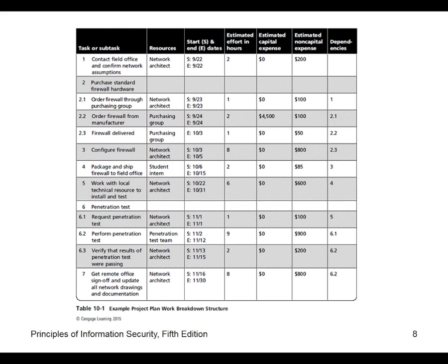How long is it going to take to do this? Okay, again, we're applying for a grant, and we have a room that has a beam in it, like a concrete pillar. What's it going to cost to remove that pillar? We had to know that. So our guy contacted the construction company, said, okay, I got a whatever by whatever pillar. What are you charging me to move it? Can you imagine? How would they possibly know the exact cost? So they look at, okay, we've done something similar, and the cost, so that's where these come from. We've built a room before. Here's where the cost is. But they're always off. Okay? All right.